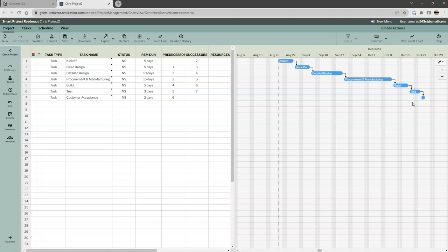A lot of organizations will run with all those phases overlapping, especially on slightly larger projects, which I won't get into the details of right now, but it's a pretty inefficient way to execute. So we really do want to, as much as possible, finish one phase before the next with only reasonable overlap. Okay, so we have this project plan in linear fashion, and so it just makes things a lot simpler in how we prioritize and assign capacity.